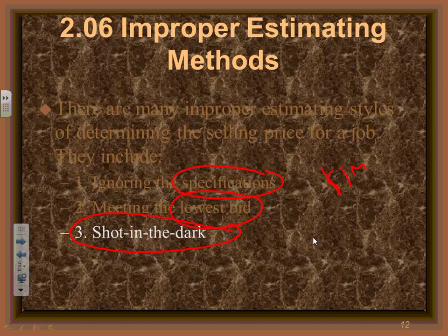Okay. I walk into the building. This hospital will cost you $5 million. And believe it or not, somebody like Dave Karski and a bunch of guys who have been around for a long time, I bet you their shot in the dark is a lot of times very accurate because they've done it. That's not a shot in the dark though. When you sit there and you measure it based on 15 hospitals that you have done in the past, and you do some calculations, say, well, there was inflation, there were expenses, and so on, you come up with a number. That's not a shot in the dark. That's using experience. A shot in the dark is you walk around and you just throw a number.